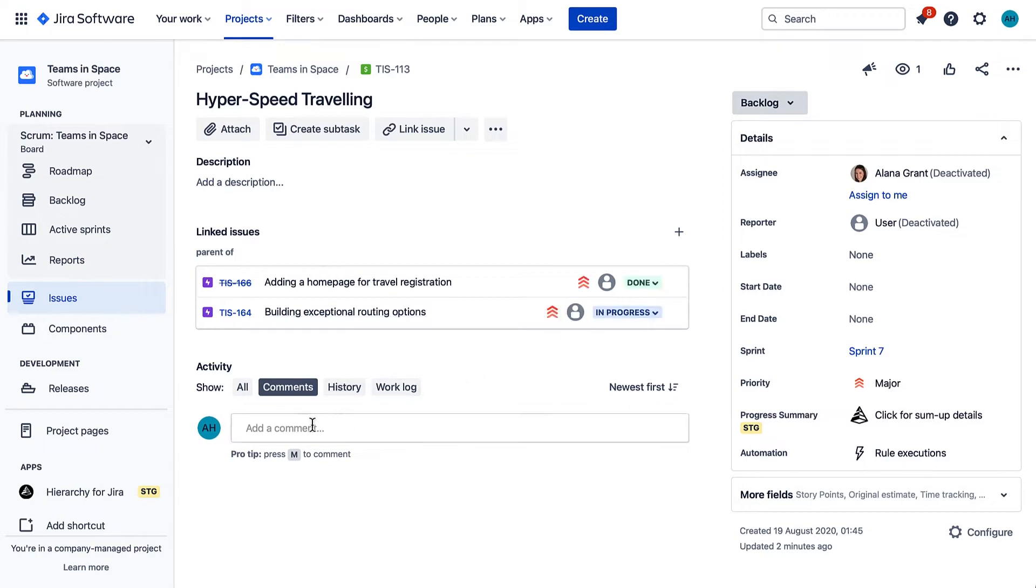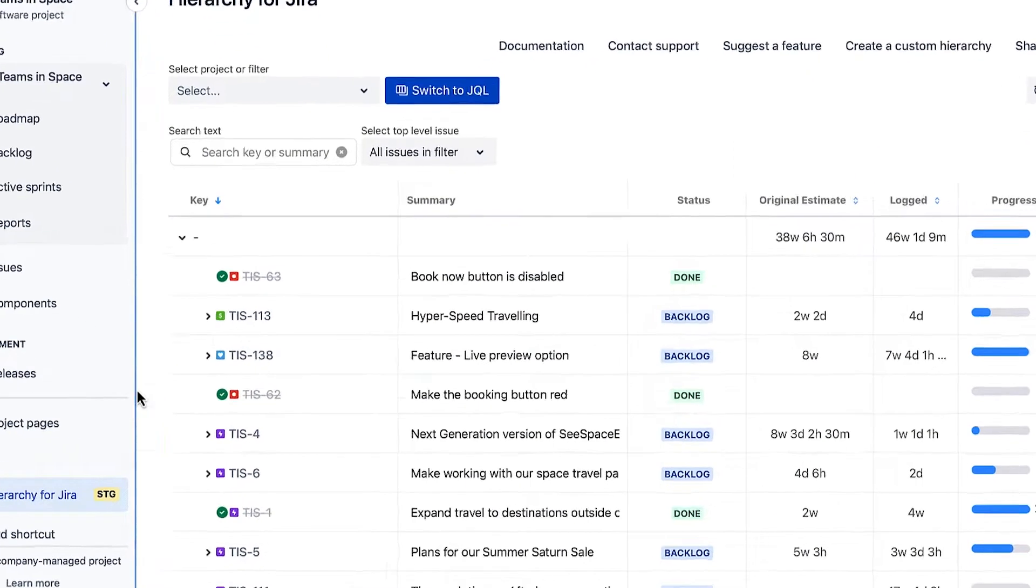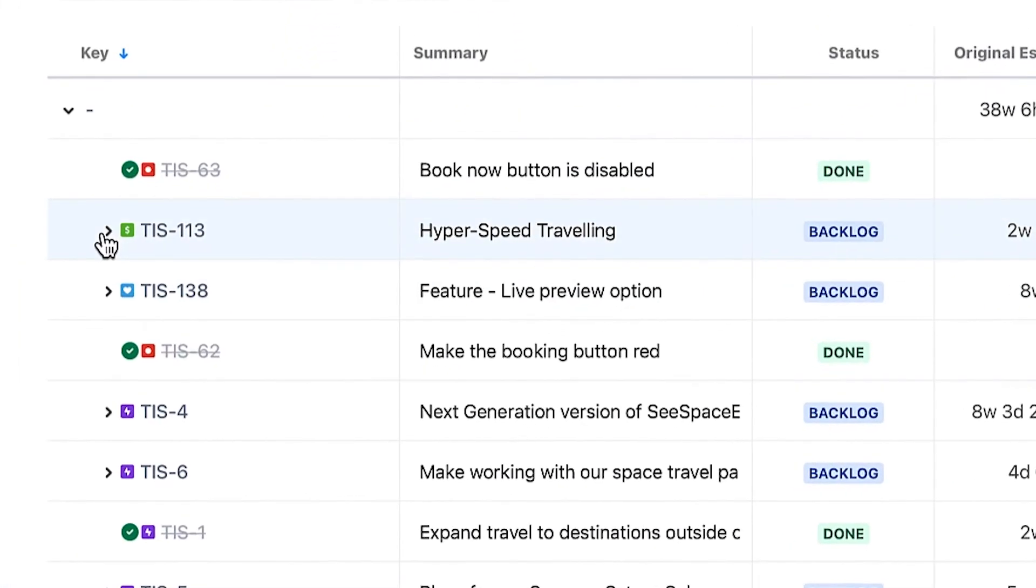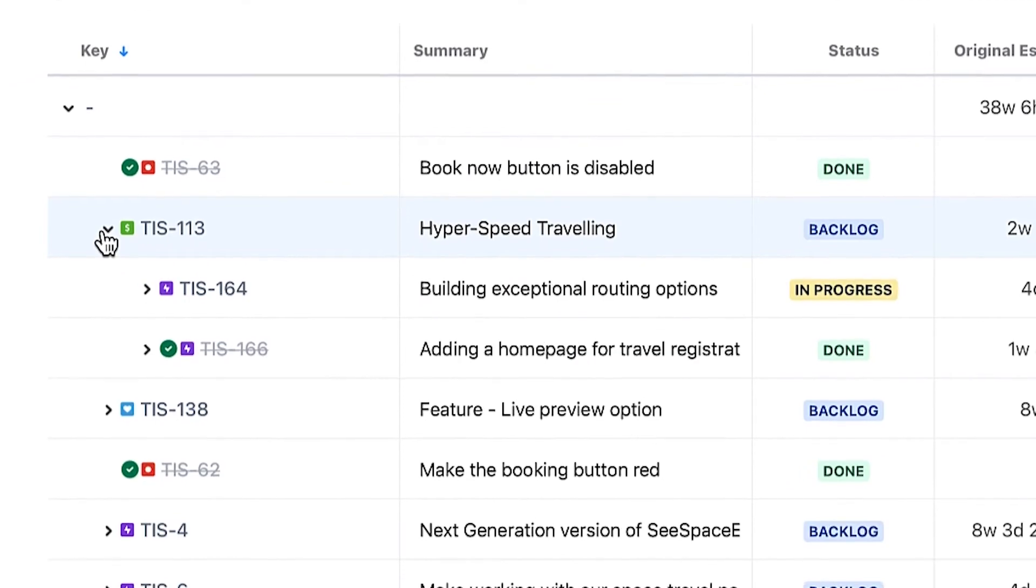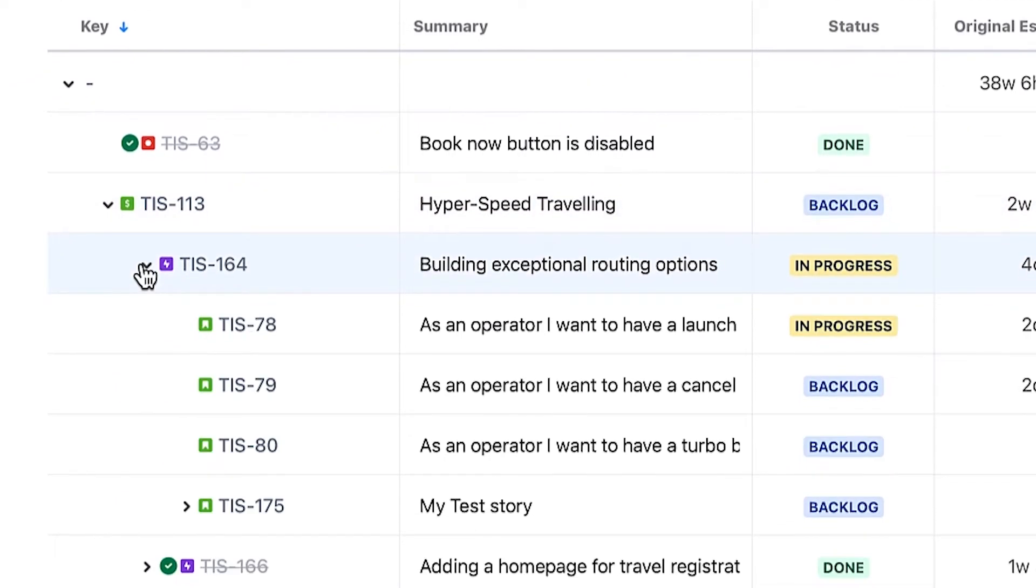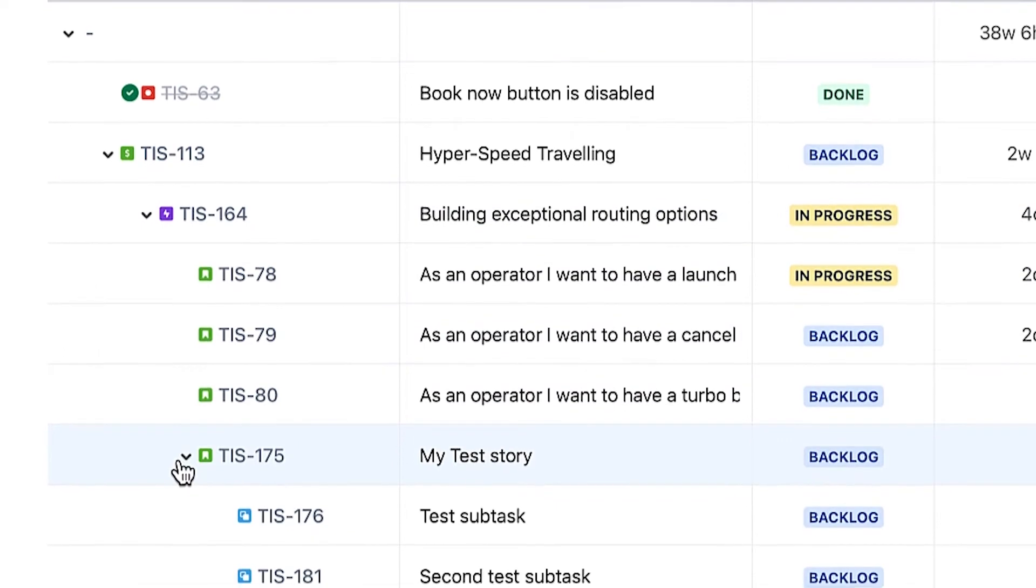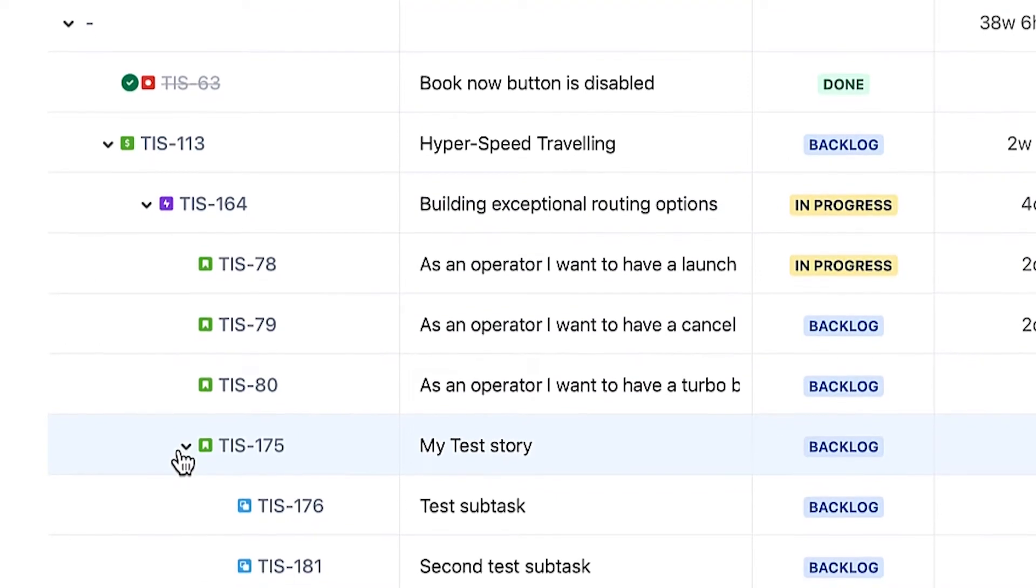Now when you select Hierarchy for JIRA in the left-hand menu, you'll be able to see the new hierarchy including the initiative, the selected epics, and all their linked issues and subtasks in a simple tree structure.